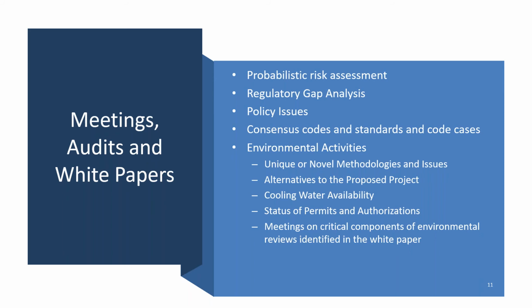Furthermore, early discussions in areas such as socioeconomic characteristics of the community, aquatic or terrestrial ecology studies that have been performed, federal listed species and potential impacts, as well as historic properties, will be areas that the environmental review staff has identified as matters that have become controversial in some cases, affecting the review schedule.